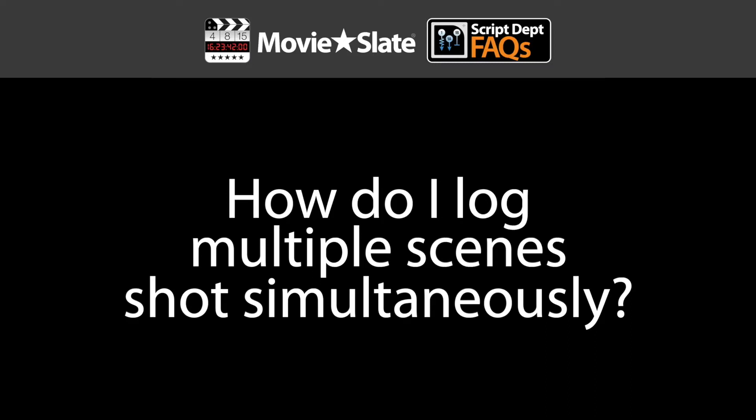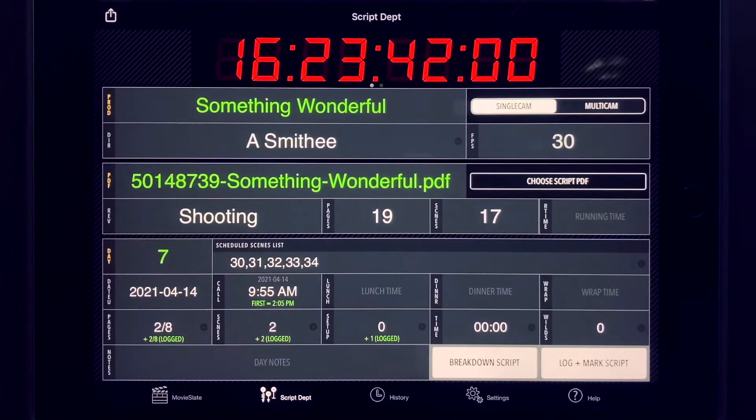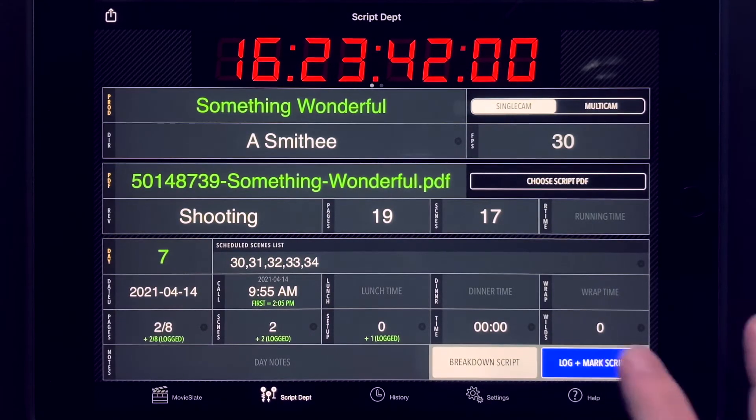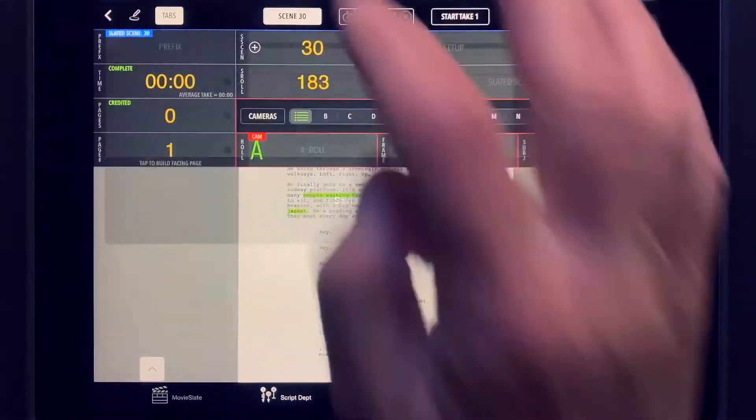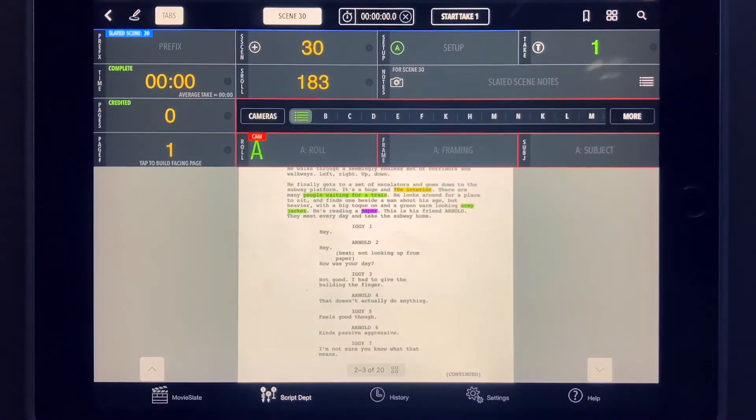You can easily log multiple scenes that are shot simultaneously. From the Script Department's Log and Mark screen, tap the Scene button to view the data fields.